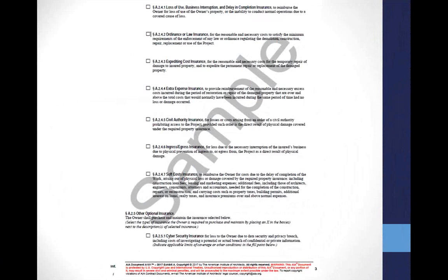Because if somebody's got an uninsured loss that could have been insured for very little money, in a construction arrangement, right? At a minimum, the owner could have a budget problem, right? So, not saying the project gets shelved, but if you had a loss and it was uncovered on a builder's risk policy, the owner can have a budget problem because you're gonna have to be paid again, right, to finish the work that needs to be repaired. This can help you avoid that.